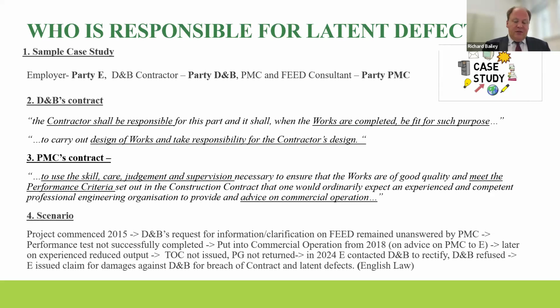Also, the other part is that where there's been some error in the design, negligent design, so you've got a tortious claim. You actually have a choice then. Do you go under contract or do you go under tort for your tortious claim? And that's one of the points that will always be considered. And you'll look at the terms of the contract, because sometimes there'll be an exclusion of tortious claims or common law claims from the contract. Sometimes there won't, and you've got a choice of which way you wish to go. A lot of that will then depend upon what the likely losses are and whether you are looking to recover, and the limitations on the type of loss under the law of tort, or express contractual exclusion of certain types of liability where there's no exclusion at all.